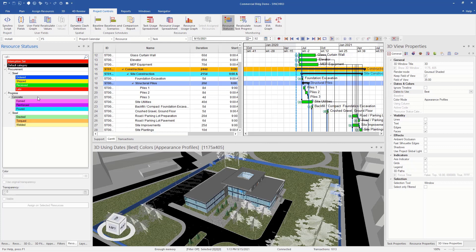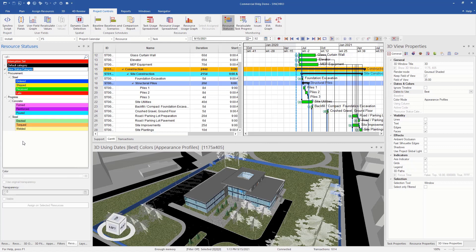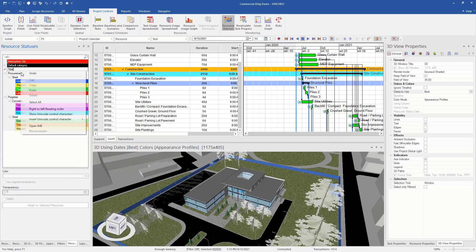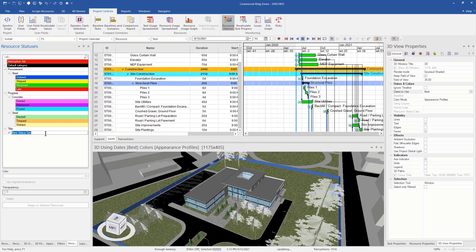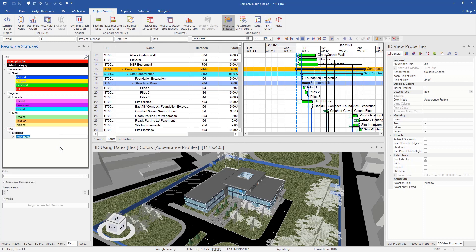So the structure you want is you're going to want to have your resource status title, the discipline and then the status name. And then to do this, we would simply just go add. So we have the title, then we'd want to give it a discipline, and then from there we want to give it the actual status name. That's kind of the hierarchy of how the resource statuses work.